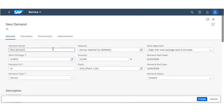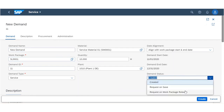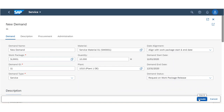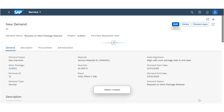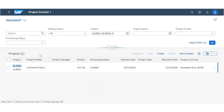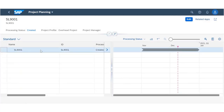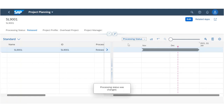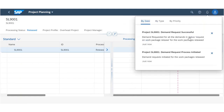Regarding the first enhancement: when creating a demand, project procurement controllers can set the status of a demand to be requested on work package release. After that, a project financial controller can release the project as part of the project planning application. They will then automatically get a notification from the system once the demand request process is initiated and once it is successfully requested.